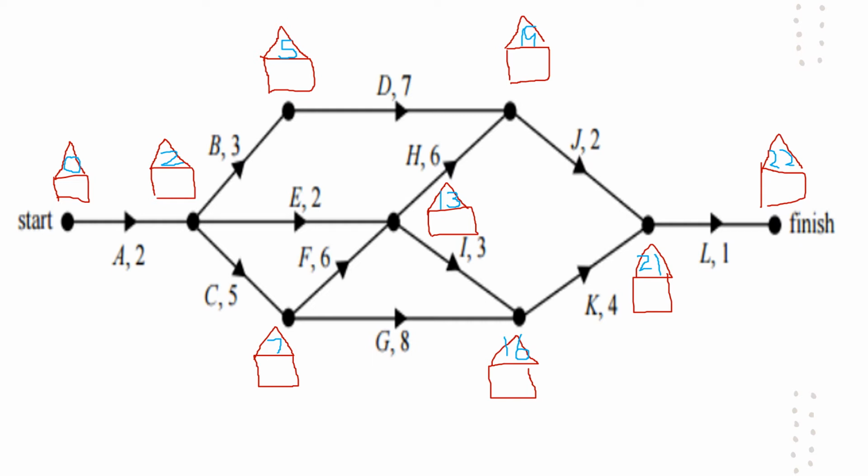All right, so now we need to perform our backwards scan. When performing our backwards scan, as we know, what we do is we write in the smallest valued number. As we did a forward scan, we were writing our largest. When doing a backwards, we write the smallest. So rewrite whatever number that you got for your earliest completion time in the rectangle below, or square. And as we go, we subtract values. So 22 take 1, 21.